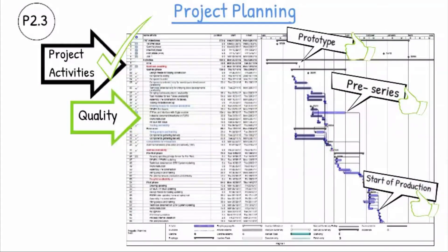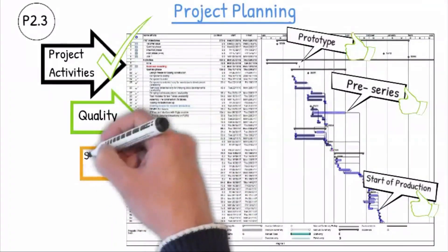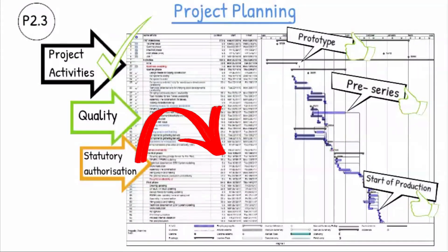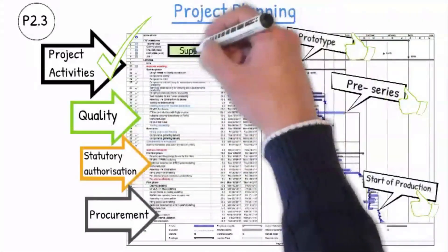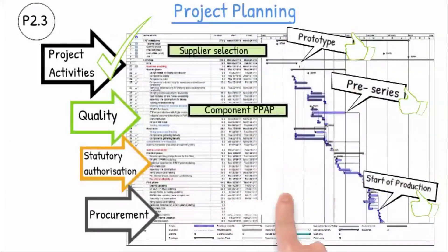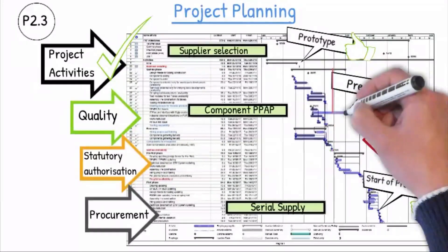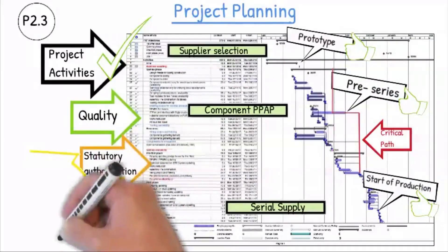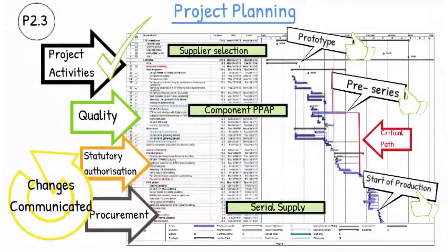The plans must take prototypes and pre-launch parts into account. If a statutory authorization procedure for a product is specifically required, the duration will be included in the project plan. The project plan will also include the detailed activities concerning procurement to ensure the suppliers are integrated in all activities. The critical path is generated from the project plan and takes account of critical delivery items to ensure that the customer's key milestones will be achieved. All changes made to the project planning will be communicated internally and coordinated with the customer if they are affected.